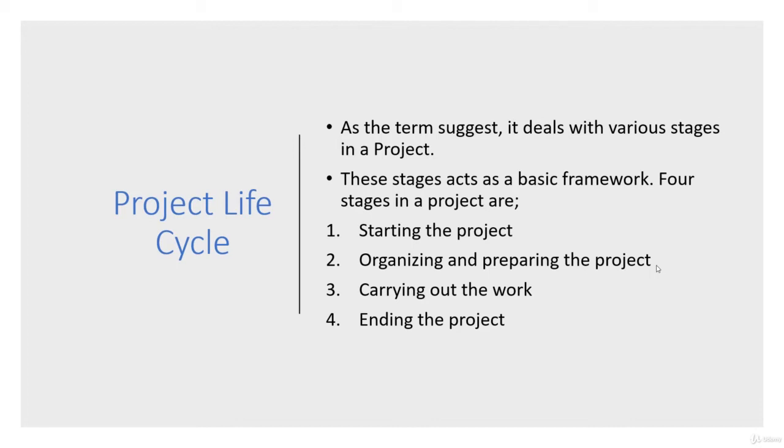But in step 2, they need to get more information, and they need to fine tune their estimation to make sure that there are no surprises. If everything is within range, then it's fine. But if it is moving beyond the tolerance limit, then they need to again go back to the sponsor and see if they can get additional funding. So all of that, along with getting the logistical support, because organizing and preparation here basically means that they are also going to acquire the resources needed to implement this project.